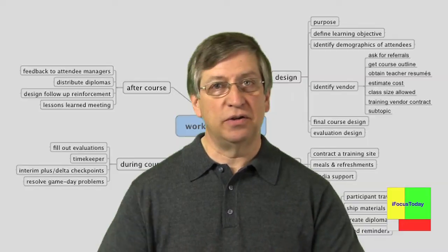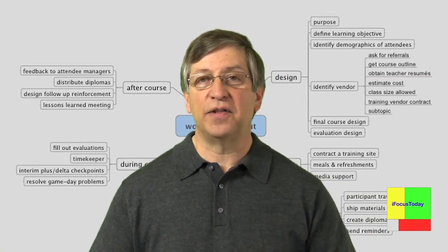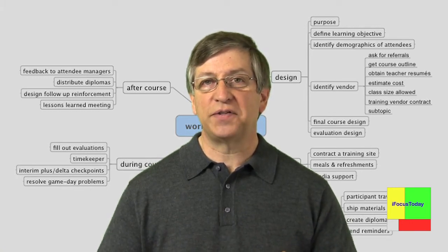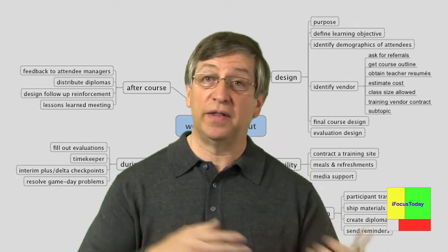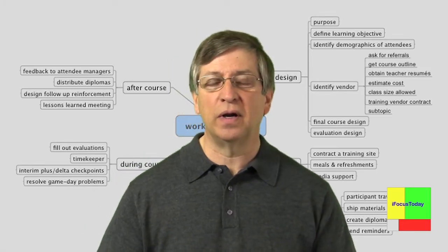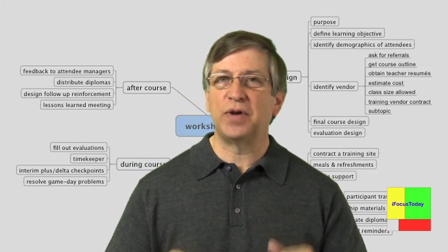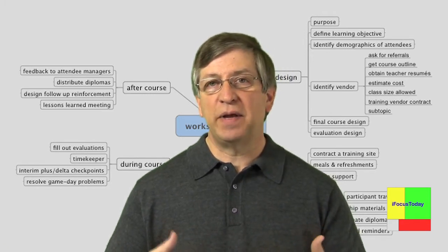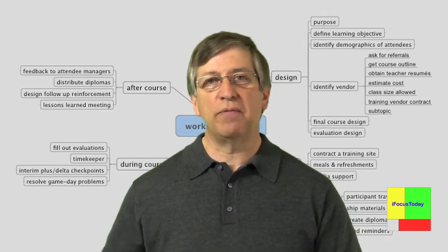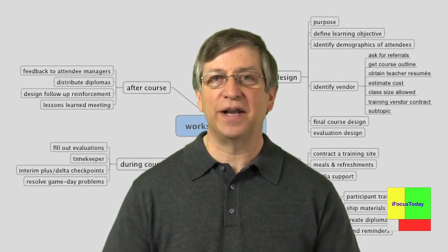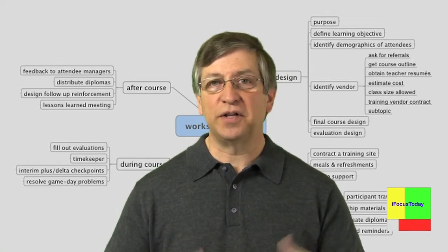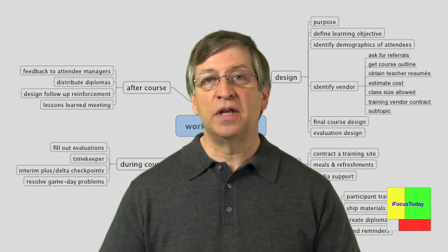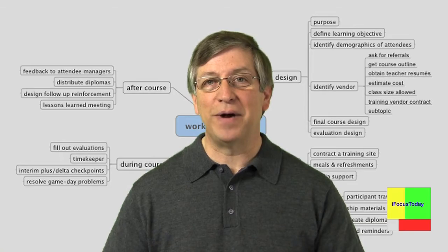The first goal is to just rapidly collect everything, and this is why I like to use software, because it's so easy to do that. In a team process, you'll build the whole thing up on the wall, and then I generally transfer it into software. But you want to get everything captured, not worry so much about the organization. If you're doing this on your own, spend 10 minutes, write down everything you can, put it away for a while, come back later that day, come back the next day, take another 10 minutes and keep building it up until you're comfortable with it, that it reasonably represents the goal or the project that you're trying to map out.